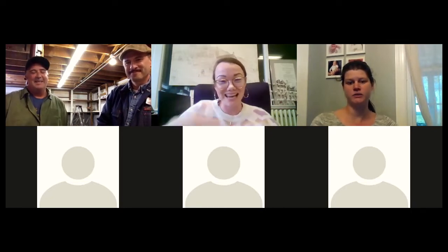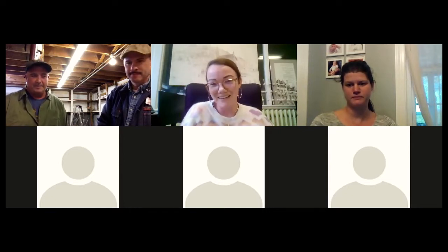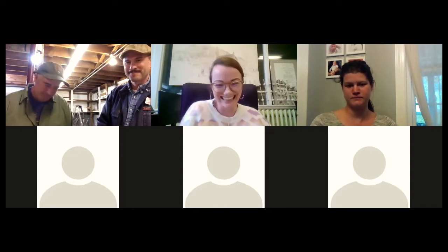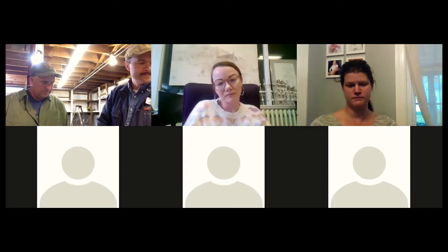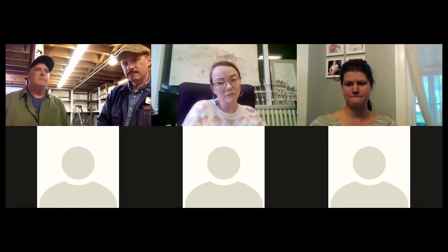Yeah, it's a good starting point to then be explored. Excellent. Yeah, I agree with that. Go ahead, Kels. Just seconded. I also think it depends. If you're doing an addition on a house, yeah, it's going to go up or down. If you're given an estimate to tile a backsplash, and the guy or the gal comes and tells you it's going to be twice the price when they get there, that's a smaller job, and your contractor should be able to relatively stay within the means of the number they give you. That's fair. So that varies based on the scope of the project.